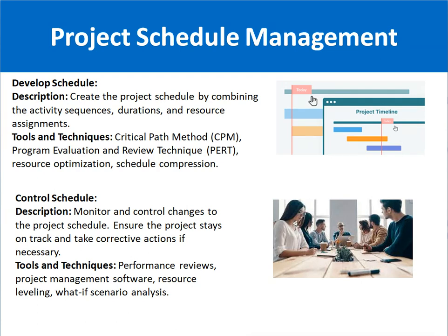Then develop the schedule. Develop the schedule means that you now have the identification of activities, you have sequenced the activities as well. Now you have to create the project schedule. Project schedule means the proper project schedule, how much time is required to complete a project. It will contain the activities, durations, resource assignments, all those things are mentioned. Normally I use Microsoft Project for developing the schedule.